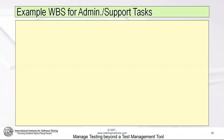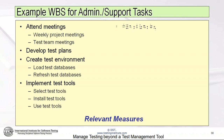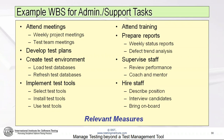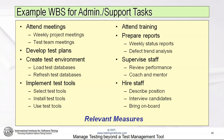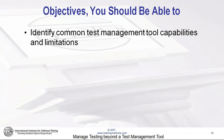Taking a project view also enables us to become aware of all the non-test-driven things we do: administrative and support tasks like meetings, doing test plans, creating the test environment, implementing tools, attending training, reporting, supervising staff, and hiring staff. When testers compare the time spent on test-driven tasks versus administrative and support tasks, they tend to be dumbfounded by the percentage of time they were totally oblivious to. Most would say it's at least half their time; one group I worked with said administrative and support tasks took about seven times as long as all the test-driven tasks combined. Test management tools are oblivious to all of this.